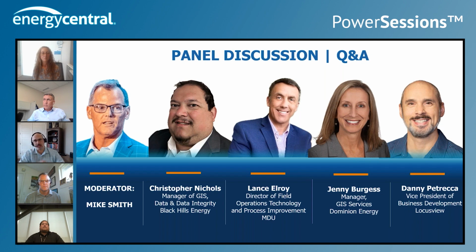And Chris up at Black Hills, you know, their traditional as-builting workflow is to go out after construction and capture the data, capture the GPS locations. But they did pilot, and they brought on a new person who was actually an underground trench inspector, I believe, Chris, you can chime in, I'd love to hear from you. They piloted this to take Locust View and capture the data during construction, which, you know, it's going to be buried, so let's capture this data now rather than after the fact. Chris, maybe you could talk a little bit about how that worked out for you guys.